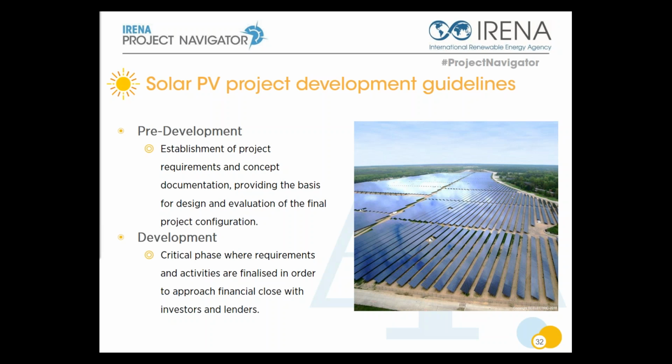So we look at general bankability requirements and specific bankability requirements, looking at project technology, location, type of contract, permitting, investment, and project structure. And we provide recommendations, and we also say that traditional specific bankability criteria for solar PV technology will be: do my partners have references of existing projects?